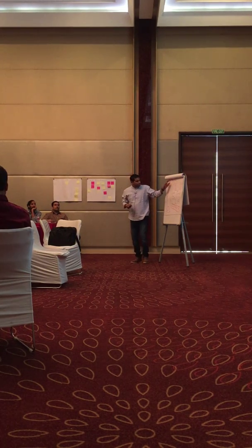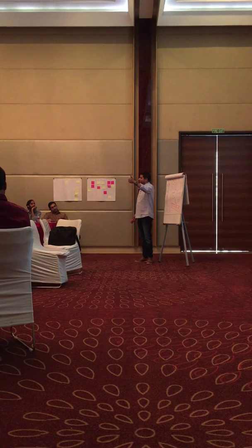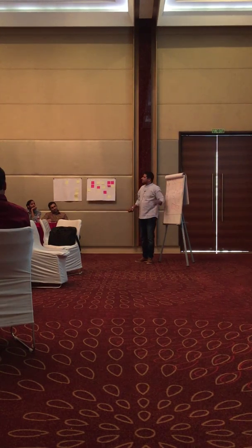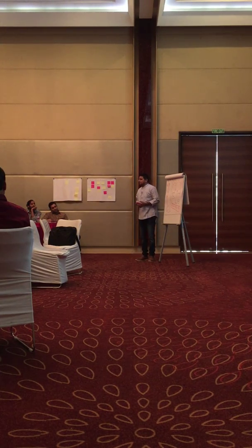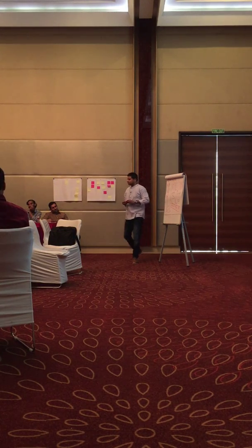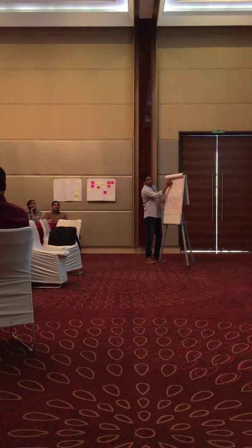So items from this backlog belong to this release, and this sprint will be implemented like this. In the planning part, they discuss it and estimate it. In the execution, they do analysis, design, development, testing, all these things. In the review, they demonstrate to the product owner and get sign off or not. Then in the retrospective, they do how we can inspect and adapt, how can we become better and better sprint by sprint. You can consider this is the superset, the release backlog is the subset, and the sprint backlog is a small subset.